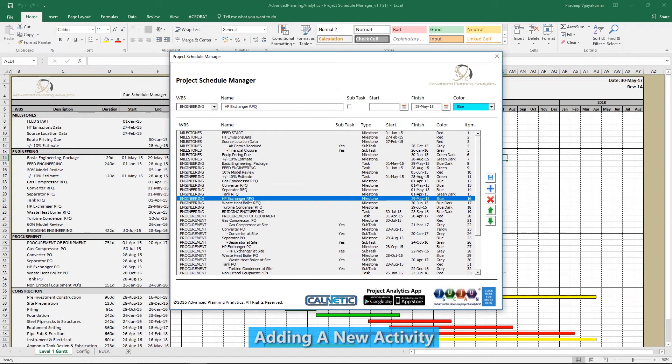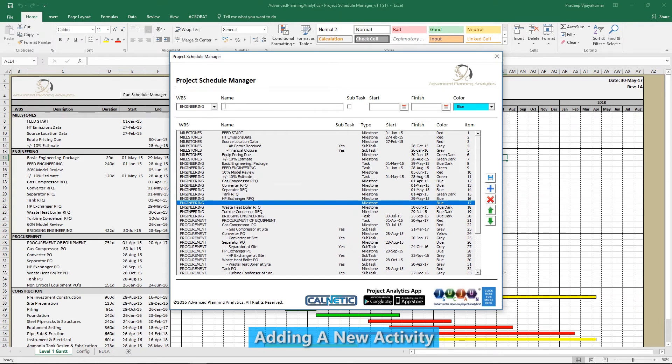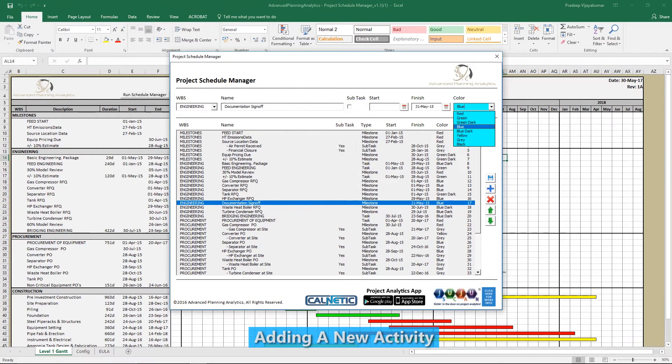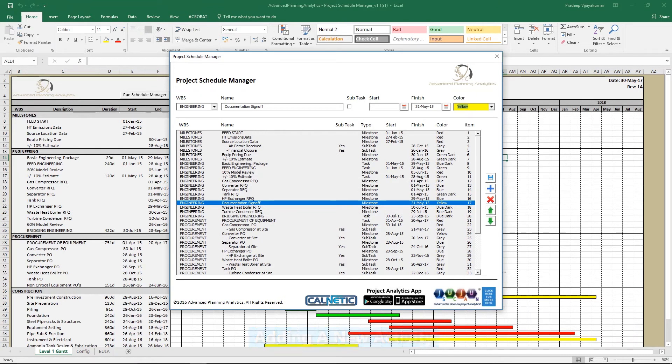To add a new activity, click on the Add button. Now choose a WBS mapping, provide a name, specify if this is a sub-task, and choose a start and finish date in addition to a color code.